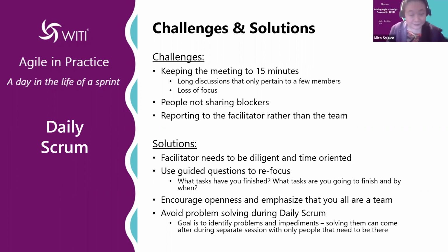A lot of this is very challenging as new Agile teams form. Estimation is always the toughest, it's very biased. So therefore, we have to look at, again, what's the purpose and the value of why we estimate. And if we do use estimation, whether you use t-shirt sizing or story points, you really let the team, as a coach, use the modified Fibonacci sequence, so that you have an understanding of the effort of the work, including the various factors and the complexity as well. Because without estimating, it's really hard for your product owner to plan and forecast the team as well.